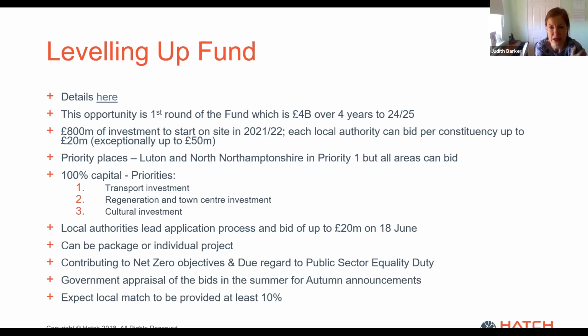And in terms of the spend, my understanding on the Levelling Up Fund is these projects need to be able to start on site by March 2022, and that is a gateway criteria matter. So if you can't start on site by March 22, you're not likely to get through the process. And in terms of the Community Renewal Fund position, my understanding is that all of the revenue needs to be defrayed in 21-22. So in other words, if you receive the money in the autumn, the challenge will be to spend all the money by March 22. So it is a heck of an ask.